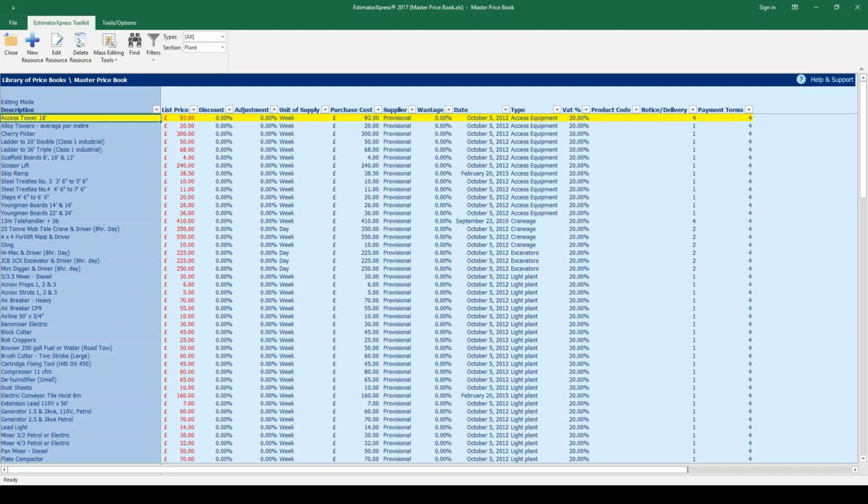If you own it, you still need to charge for the use of it, otherwise you're not covering your own capital expenditure on those items. And any profits you think you're making will in fact disappear when your accountant looks at your books. You'll see that the plant prices here are in red. That means they are not kept up to date by HP Excel Price Tracker.